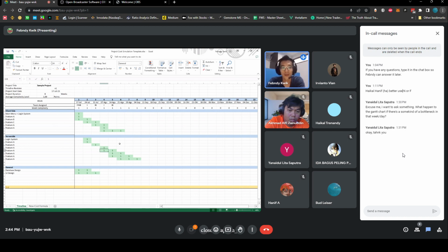Okay, this way, if you knew there's going to be a bottleneck, you kind of prevent it by doing this. And you know that if you have a server, sometimes the client, most likely they're going to be waiting for the servers. Main menu perhaps not so much, but you can do this as well. So main menu can start first, because for the main menu you don't need the servers, and then the login system.